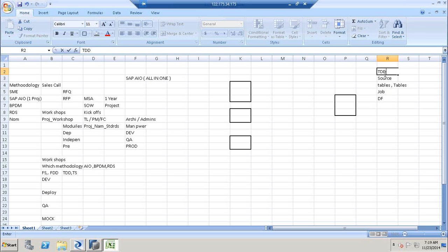Somebody who understands this, generally the leads, will do a review on the code. Peer review is to check that every segment of this document is filled: the source table names, the target table names, and proper naming conventions. Those will be covered in the peer review.